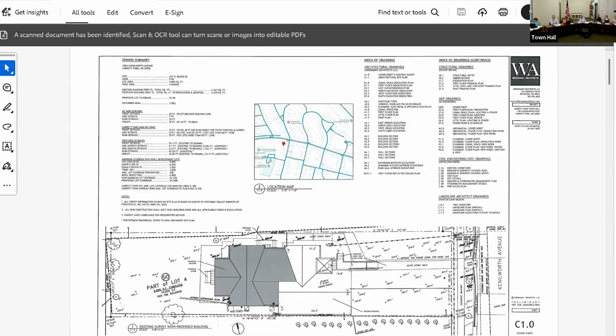So, speaking specifically of windows and doors, I spoke to the cost estimator, and he mentioned that that particular line item can be very variable. So I offered to go to our suppliers and get an actual bid. And I will give that bid to the cost estimator, because he felt that that was one area that he didn't want to just use a database for. Good. And who's your supplier? Well, we have specified Marvin, and Forbes Designs is the supplier. In general, lumber yards are going to be similar in terms of the product.